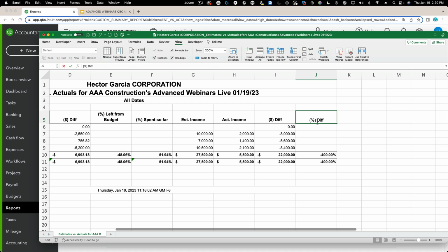And then we're gonna have a percent invoiced from project. And then in here, we're gonna take what we've actually invoiced so far, which is 5,500 divided by 27. And this tells you that so far we have recognized or invoiced 20% of the project. That's because that's how we did it with the progress invoice.